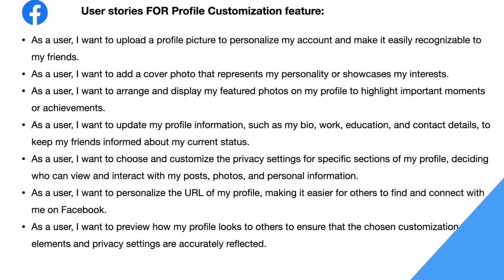So we list them in user stories. One, as a user, I want to upload a profile picture to personalize my account and make it easily recognizable to my friends. That's one user story. And then we will estimate it later, not in this session. This is just the requirement gathering stage.